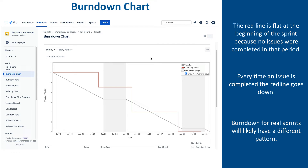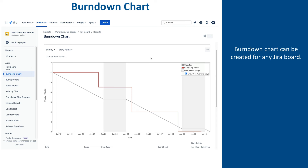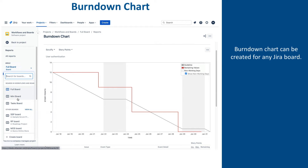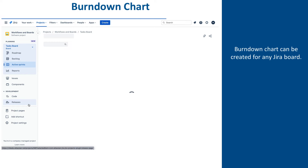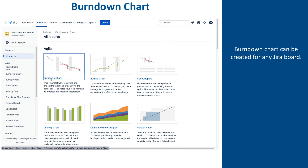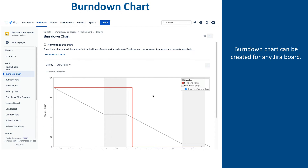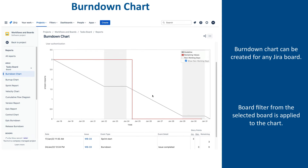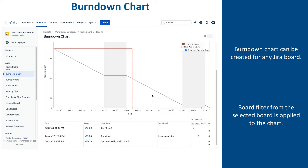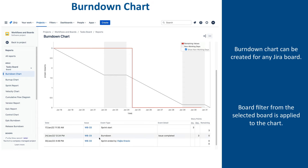Don't expect your sprints to progress perfectly like this one. Scruffy Sprint is not a real-life sprint — it is meant to demonstrate board and workflow features, so it was intentionally kept very clean. We will shortly look into examples of burndown charts from a real Jira project. Let's see what happens if we select a different board. From the board drop-down, we will choose the Tasks board, and we unfortunately get sent to the active sprint screen, which is another Jira nuisance, but we can right away click on Reports and Burndown Chart to get back. Notice that the chart looks completely different. The reason is that the board filter is applied to the chart, and in this case we see the burndown chart only for issues that are task type, because that is how we defined the filter for this board.